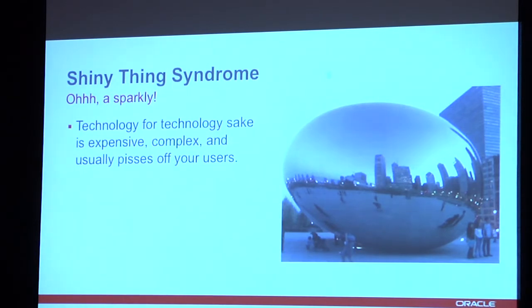What happens is that we install the technology, and as soon as we get to the bake-off side of our projects, the projects get derailed almost immediately because we start turning knobs, we start trying to test the limits of all the features that these products have. And when we do that, we typically spend 8 to 12 months doing our proof of concepts. We'll do another 6 to 8 doing our pilot, and then we fail, because it never moves to actually deploying something that's useful for somebody in your company.